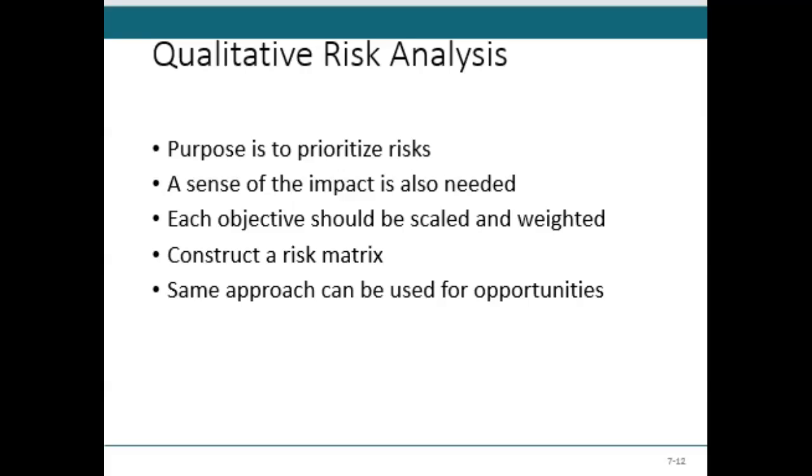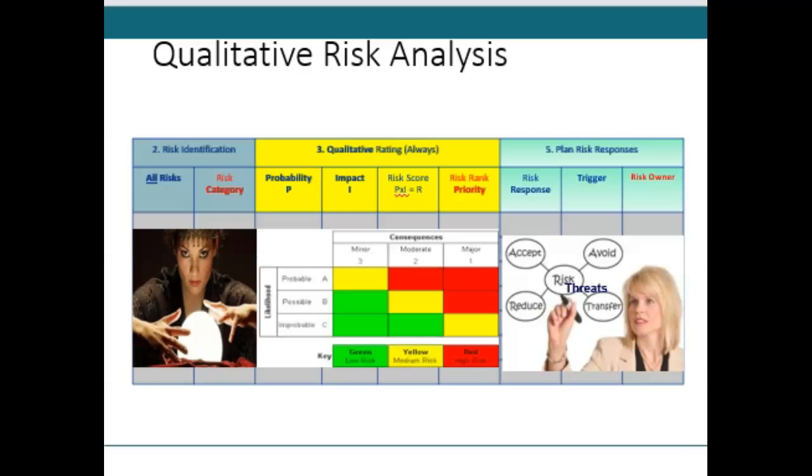Now, through this course, we'll look at qualitative risk analysis. So we'll take the long list of risks in my risk register and add a subjective probability and impact. It's quick, it's fast, but it's good enough to prioritize risks before I jump into quantitative analysis, response planning and control. That's the goal. I need to prioritize the risks, and that's what this slide is meant to say. On the left we have variability risk, like weather, which is something of high variability. Later we'll do risk planning on how to avoid them or mitigate them, or if it's an opportunity, take advantage of them. Ambiguity risk is when we have imperfect knowledge.